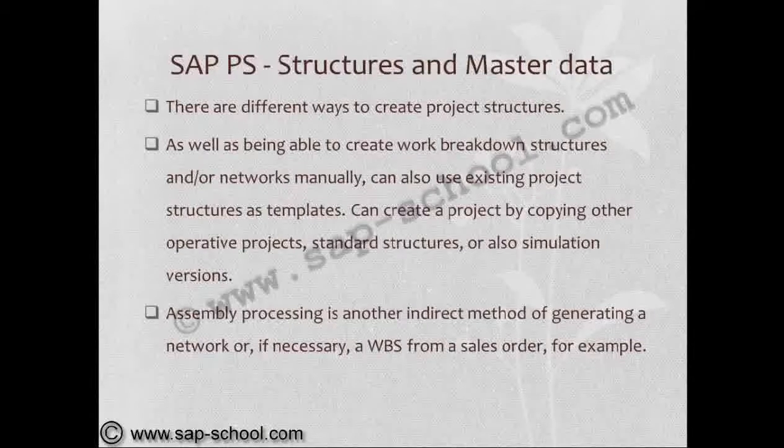If it is a similar nature or category of project, we can use them as templates to create a new project structure. You can create a project by copying other operative projects. Standard structures are also simulation versions. So these are all different ways to create project structures.